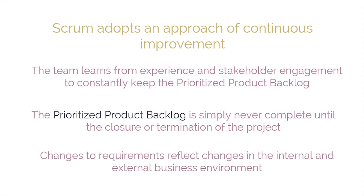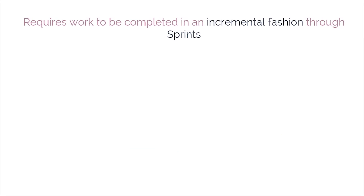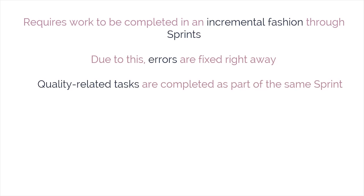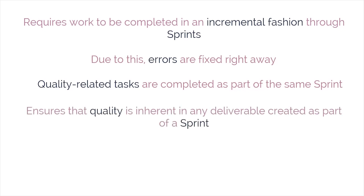The prioritized product backlog is never complete until the closure or termination of the project. Any changes to requirements reflect changes in the internal and external business environment, allowing the team to continually work and adapt. Through repetitive testing, Scrum requires work to be completed incrementally through sprints rather than waiting until the end to produce deliverables. This means errors get fixed right away. Important quality-related tasks — development, testing, and documentation — are completed as part of the same sprint by the same team.